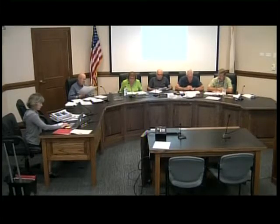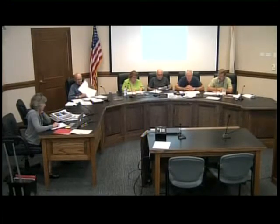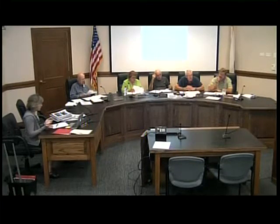So Cale has poured through the file to find all the documentation that might be necessary to close out this order of conditions, and I don't know if you want to take time to read the engineer's letter in front of you, which he also reviewed some of the prior information that was out there. So you have both the engineer's letter and Cale's review in front of you if you want to take a moment, because like I said, I'm not as familiar. One of the things Cale pointed out to me is that what can't be confirmed from the information in the file is that all of the bordering land subject to flooding was constructed at the elevation that was required by the order. The plan that's out there gives sort of a range of where it's constructed, and it doesn't seem to be in the range that was required by the order. I'm not sure I'm stating that properly, but.